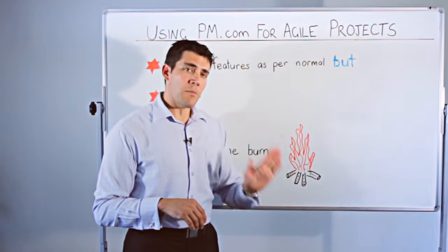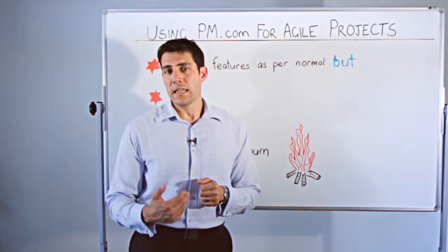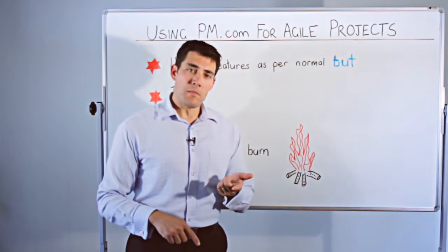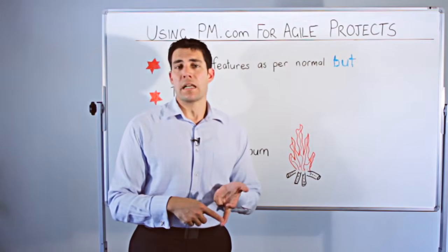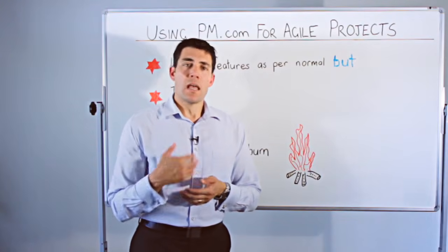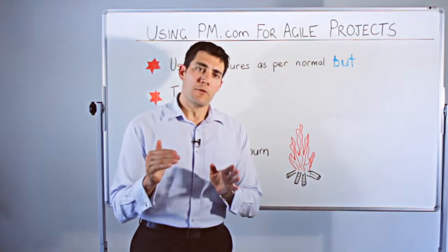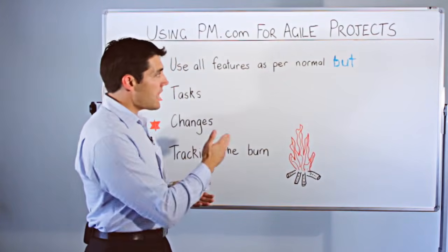They can put in how much time they're spending against each of the tasks, so you can run the report at the end of the day to figure out which team members are completing their tasks, which tasks have been completed, and how many hours have been expended to date. By getting that information, you can pull it together in a spreadsheet and put it in your status report for your burn chart. So those are some really simple ways to use the service in an Agile project.